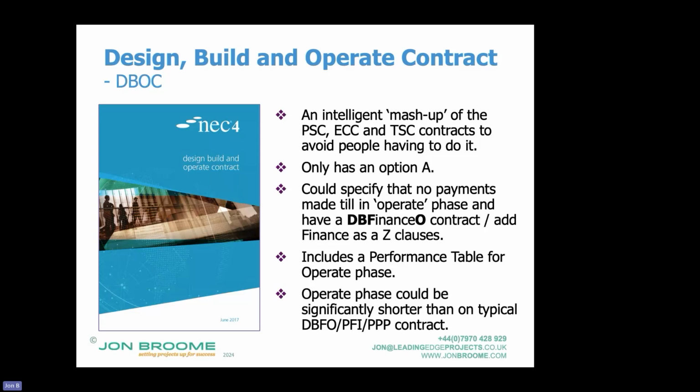Gordon Brown went a bomb on design, build, finance, operate contracts. They were known as private finance initiative contracts. And then when they became unfashionable, they became known as public-private partnerships. If you go back to the original terminology, they were design, build, finance, operate contracts, where the contractor only starts getting paid once they're in the operation phase. So they've got to go and get finance, not just until they start getting paid, but until they've been paid back those build costs plus interest.